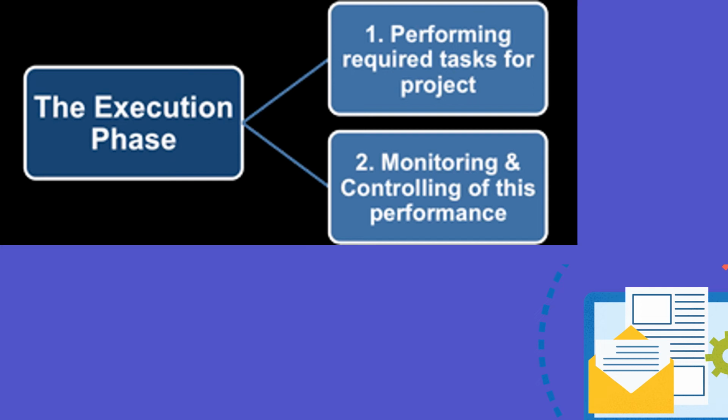The project manager uses this information to maintain control over the direction of the project by comparing the progress reports with the project plan, to measure the performance of the project activities and then to take corrective actions as needed. So kung galihis sa plano, the first thing that you can do is to bring back the project on course or to return it to the original plan. If that cannot happen, then the team should record the variation or the changes from the original plan and record and publish modifications to the plan.